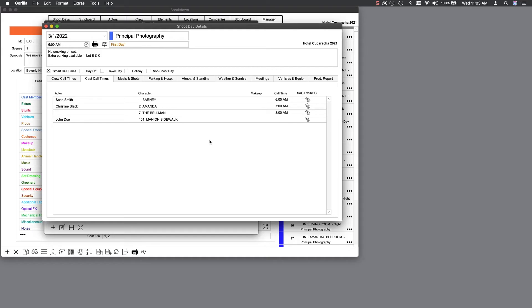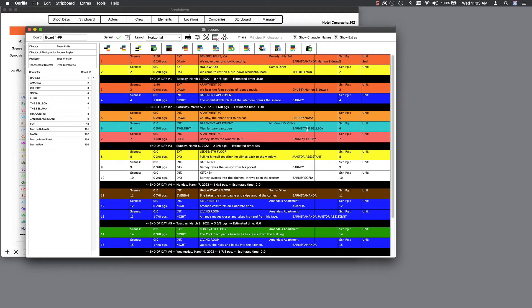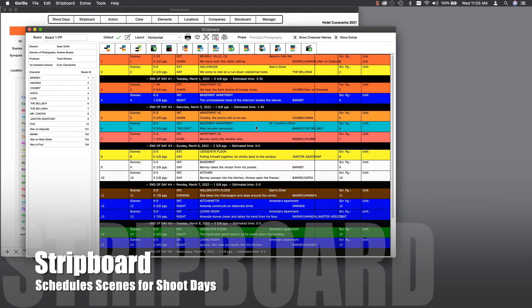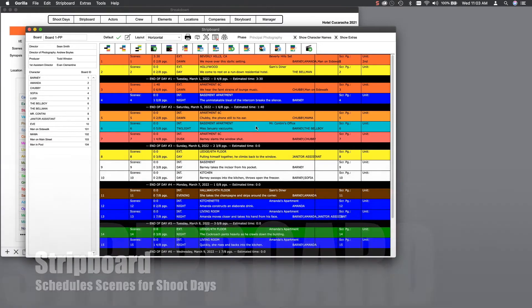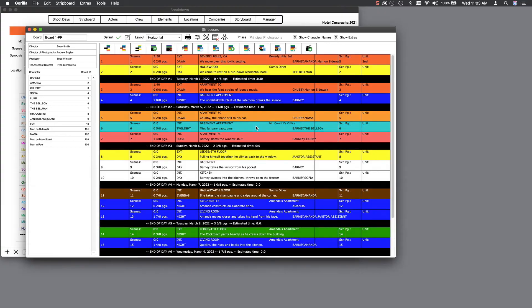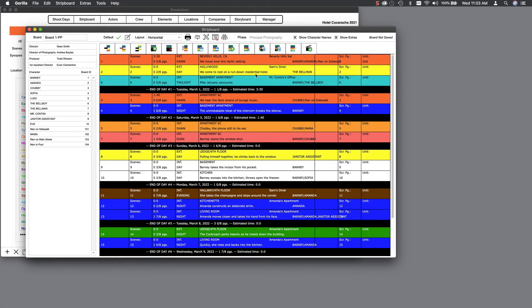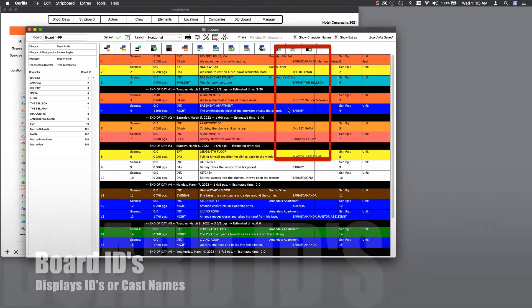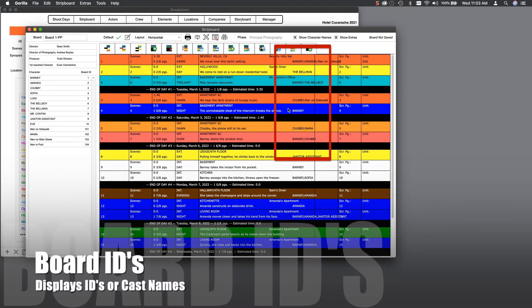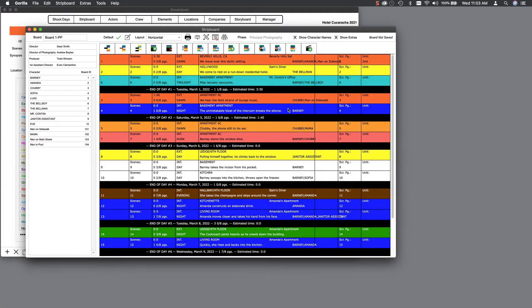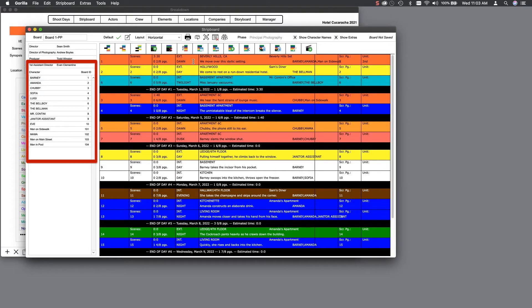Speaking of the strip board, let's go there now. This is where you schedule your scenes. So, for example, if you want a scene scheduled for the first shoot day, you simply drag that scene to that location on the board. These numbers here are very important in scheduling, as they represent your cast members. So, you can see which cast members are scheduled for each scene. And here on the left is the cast legend.